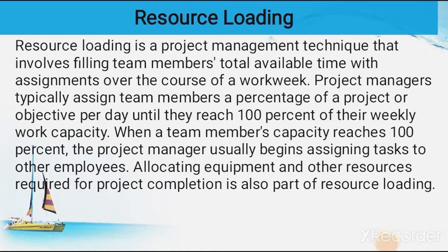Resource loading. Resource loading is a project management technique that involves filling team members' total available time with assignments over the course of a work week. Project managers typically assign team members a percentage of a project or objective per day until they reach 100% of their weekly work capacity. When a team member's capacity reaches 100%, the project manager usually begins assigning tasks to other employees. Allocating equipment and other resources required for project completion is also part of resource loading.